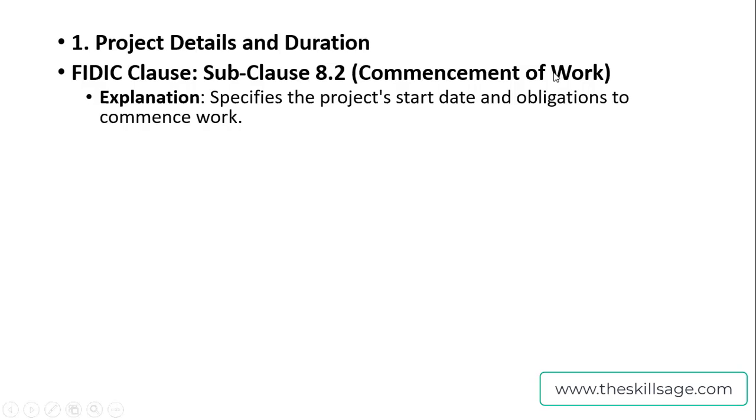Clause 8.2 instructs us on project commencement and specifies the project start date, because we are here as planning engineers, and the planning engineer defines the project schedule, and the project schedule cannot be started until you know the project start date.